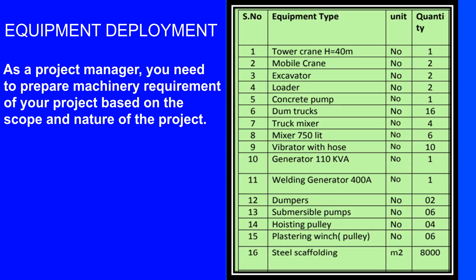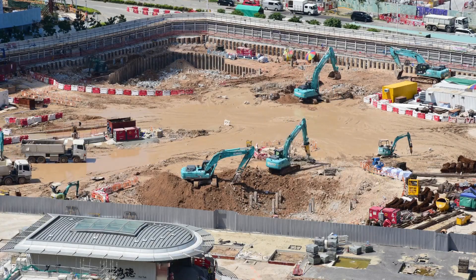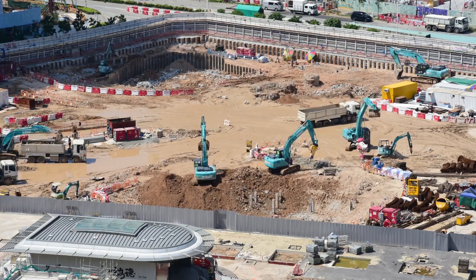When it comes to equipment deployment, as a project manager you need to prepare the machinery requirement of your project based on the scope and nature of the project. Make sure that the equipment satisfies the minimum bid requirements provided in your contract document. Out of the total equipment demand, you may deploy prioritized machinery during mobilization time.